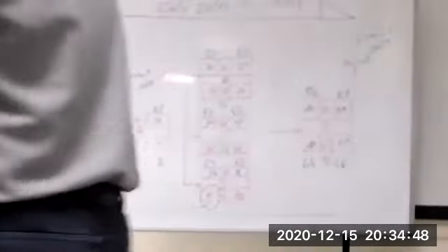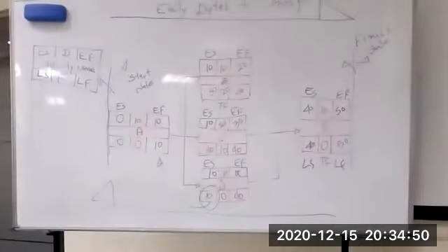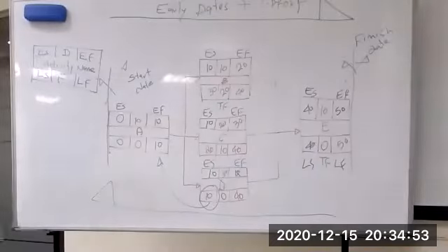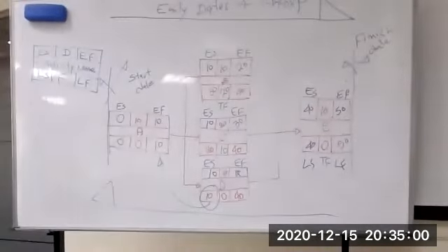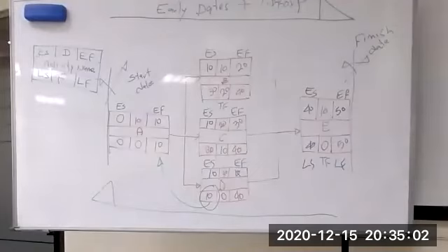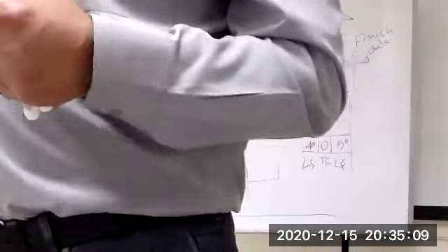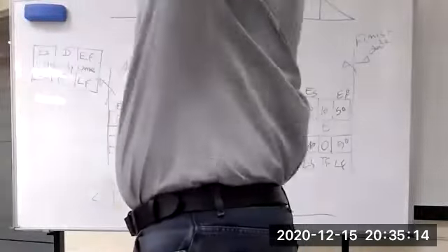It will delay the successor, but will not impact the total duration for the project. There is one example for free float. I will send it to all of you, but don't memorize it. If you need more knowledge, I will send it to you. The difference between total float and free float: total float, entire project; free float, successors. That's it. Okay?